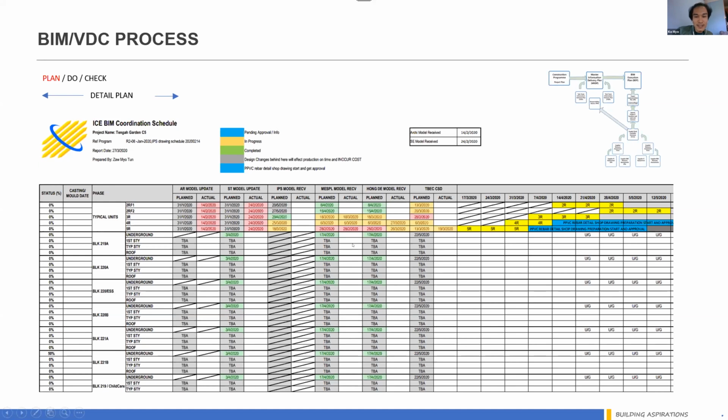Sometimes you will realize, oh, subcon, you are delaying. You cannot keep going with one man already. You need to put in more. We need to focus on that if they cannot deliver at the time that we agreed. So the MIDP, Master Information Delivery Plan, is one of the things that we always need to work out at different projects as a BIM execution plan.